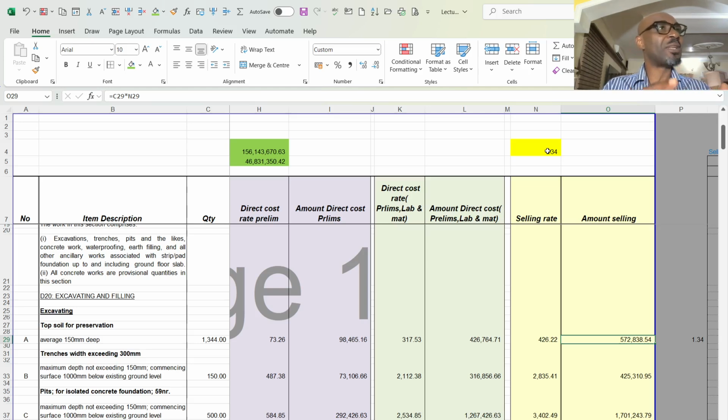There are deferred liabilities that you will incur at the end of the job, which are not an item in the bill, but certainly you are going to stay after completion, 6 months or 1 year, depending on the terms of the contract, to attend to all of those defects that will arise, and those staff that will remain there, you're going to be paying them.